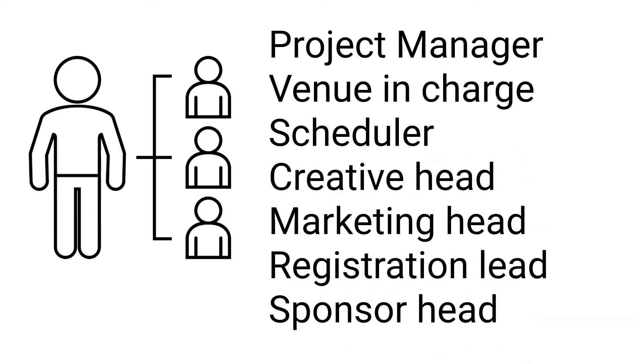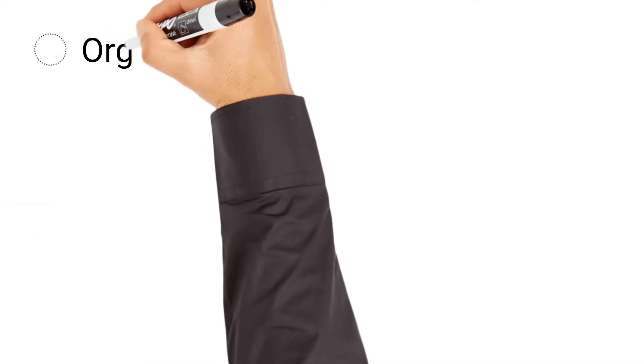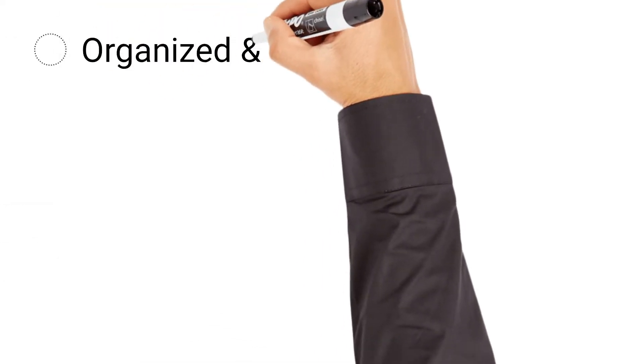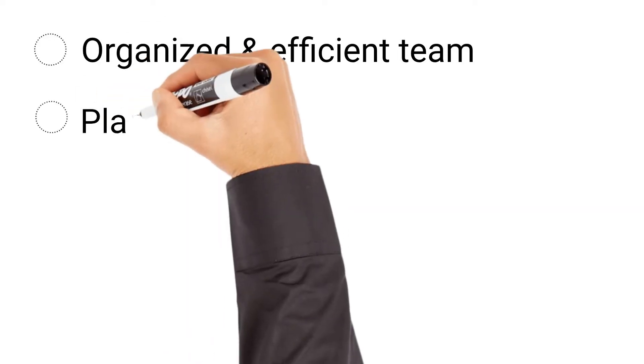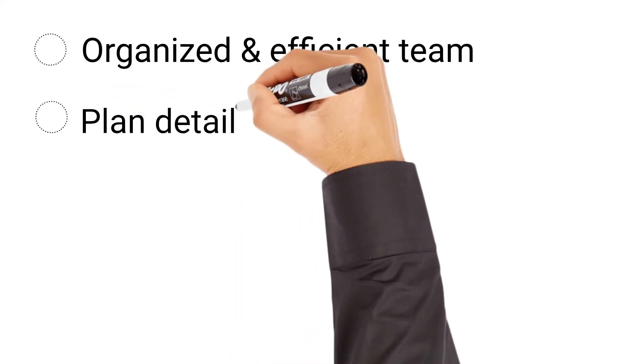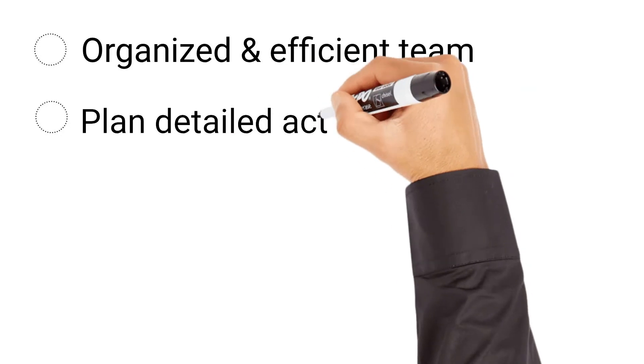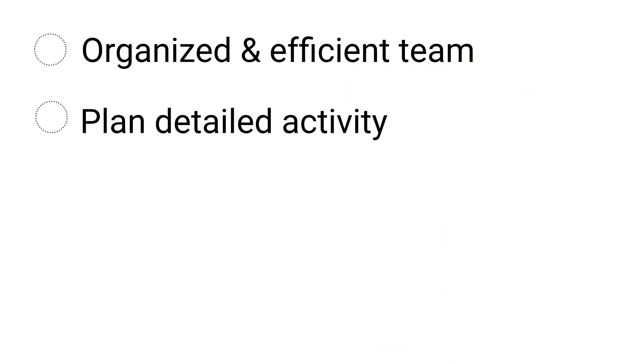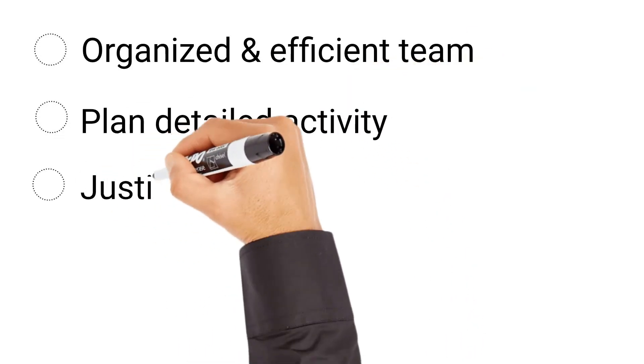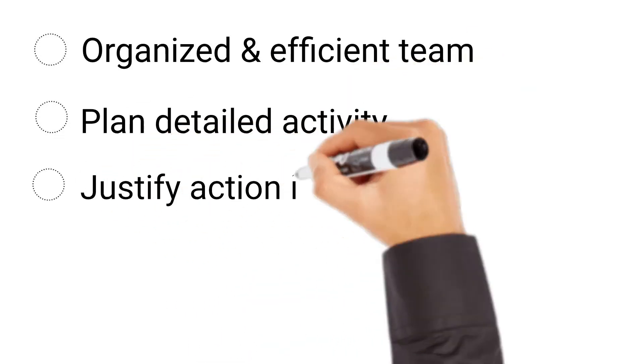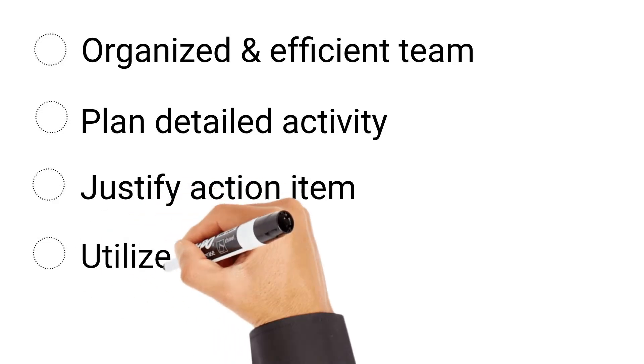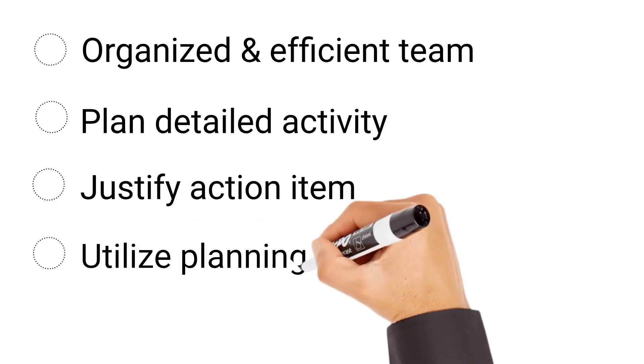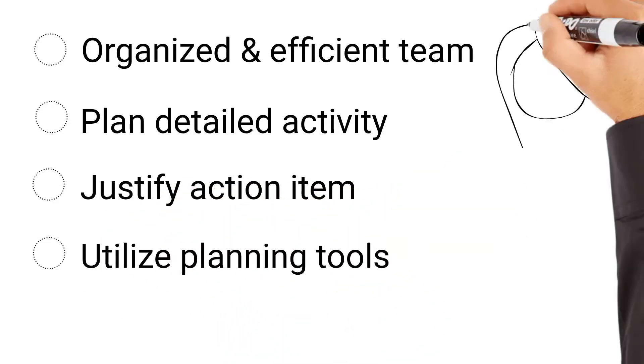Once you have got your team, the next thing is to keep your team organized and efficient. With the team in place, you're ready to create an event execution plan. This project plan is more than just a to-do list. It's a detailed breakdown of every single activity and item that identifies owners, dependencies, due dates, and completion status. You should be able to justify every action item by mapping it to your top-level event goals. You can utilize various planning and project management tools to complete this step in an efficient manner.